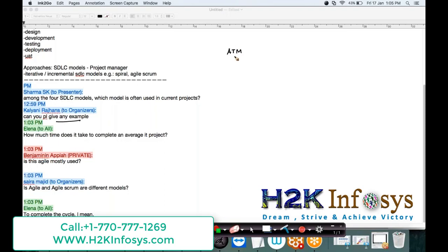If you consider ATM software, we don't develop the entire ATM software at once. First we will develop two features, cash withdrawal and balance inquiry, and then we will release it to the client. The end users will start using the software. Once they are using this, we can add more features, for example PIN change and phone number updation, and then again we release it to the end users. So this is how the software can be developed. The existing software will be in production, and we can also continue the development of further